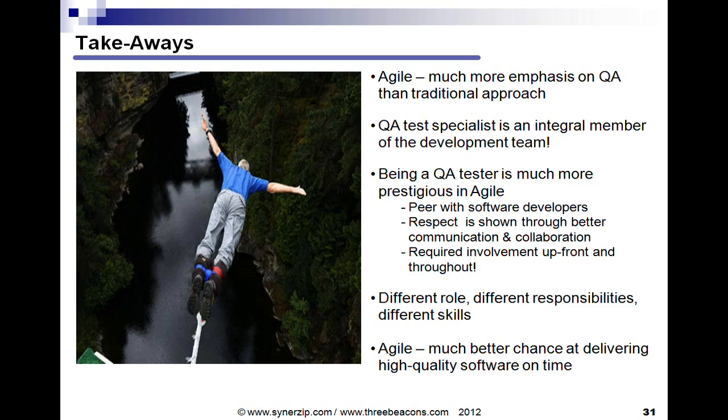Take the QSM Associates' word for it, which studied over 7,500 traditional projects compared to, I think, a handful or 29 Agile projects. And their findings show that, on average, Agile projects are delivered faster to the market, 37% faster. And Agile projects experience a 16% increase in productivity compared to the industry average. And then Agile projects maintain steady defect rates even when the schedule is compressed. And we all know what happens in a traditional world when the schedule gets compressed, the defect rate goes up exponentially.